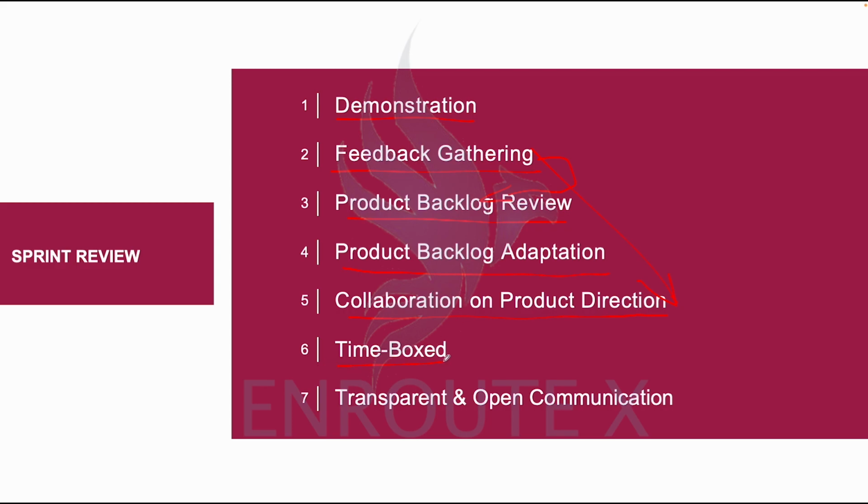The sprint review is often 1 hour. It depends on the structure of the organization. In some organizations that have scaled Agile, a sprint review session could last as much as 2 hours, 2.5 hours, sometimes 3 hours. But let's say ideally 1 hour. Then of course, sprint review ensures transparency and open communication between the team and the stakeholders.